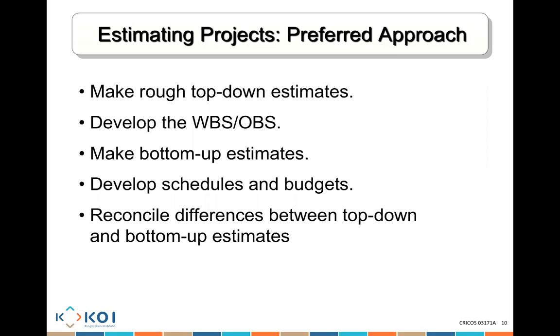When you do it, it will ensure you have very clear information about who is doing what. If the work breakdown structure is the tasks, you basically have the organizational breakdown structure, which says who is going to be doing which task. So when you create a work breakdown structure for the detailed work of how we're going to get things done, and the organizational breakdown structure of who is going to be doing what, you're going to be able to have what we call a bottom-up estimate. So you're going to have a clear estimate of how long and how much each task is going to cost me.